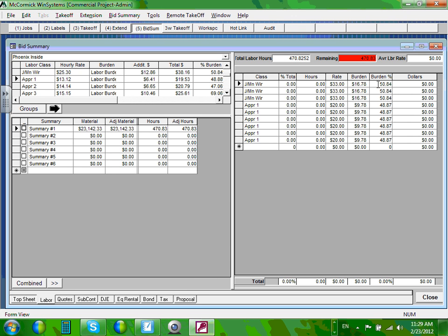Why 6, not 3? Well, you have to decide how many people are going to be working on your project, from your experience. How many people you need for this project? That comes with experience, guys. Okay? All right, so we got these 3 apprentices. Anybody knows why 3 to 6? I'm using Minnesota. In Minnesota, you have to have 1 to 2 by law.